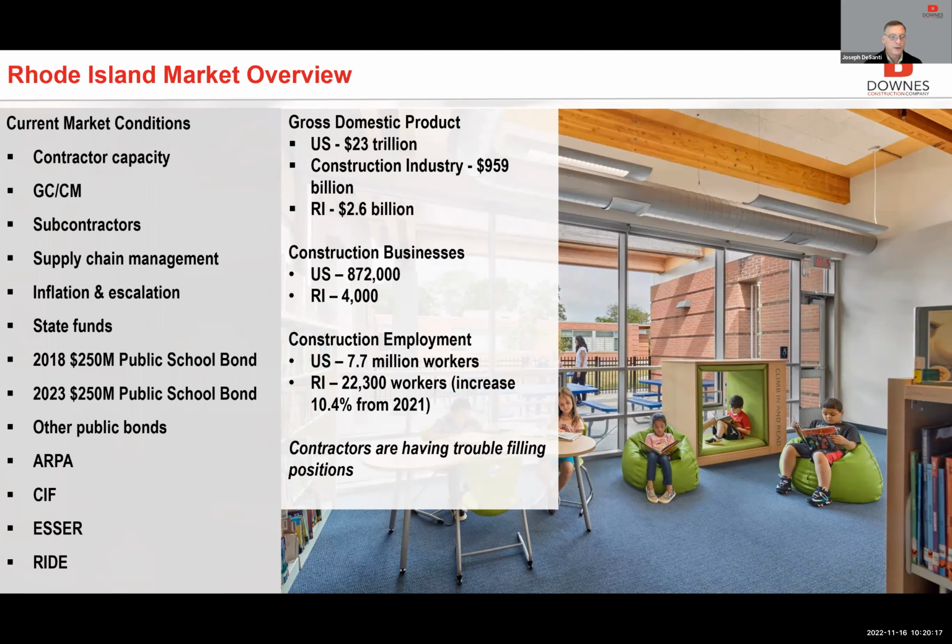Another approach that we have done just recently and are doing successfully is the design-build approach. You develop an RFP that allows a construction company and architect to come in and form a relationship to work together in the early stages. They work hand in hand. The construction company understands exactly what's happening on a daily basis with design and can respond to those designs, and give immediate feedback to the architect. Hey, we're seeing some delays in these types of products, or that cost seems to be escalating. You can make those changes immediately. It provides immediate responses. It provides a team that is working together, and it leads to a better and more thorough set of construction documents.